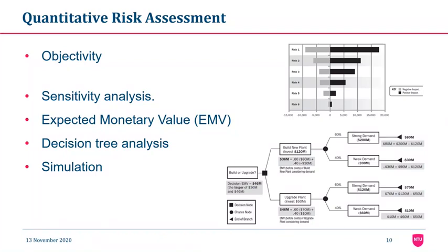The other technique is mathematical simulation. It uses computer models and estimate of risk, usually expressed as a probability distribution of possible cost or duration at a detailed work level, and are typically performed by using Monte Carlo analysis. The Monte Carlo model makes it possible for us to run multiple trials and thus to define all the potential outcome of an event or a risk.